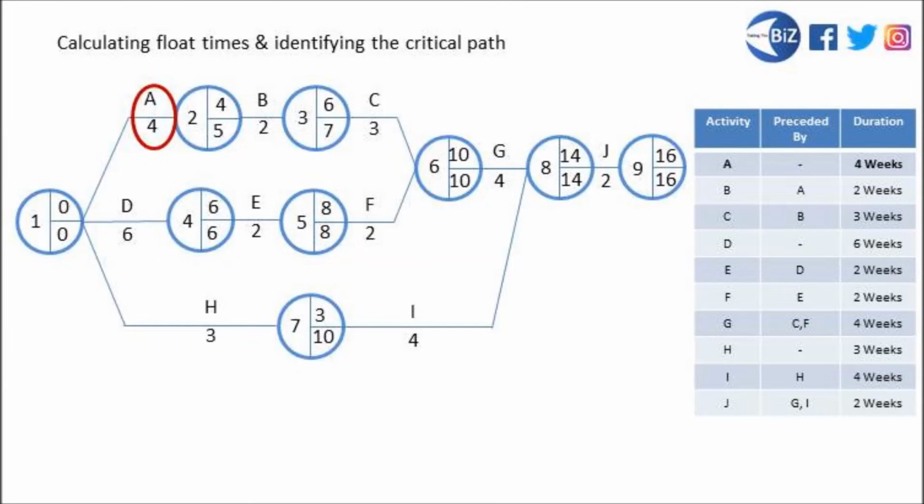And if this activity does have any float time, it means that it has got the potential to overrun without holding up the project as a whole. And if it has any float time, it means it's not on our critical path. It's not one of our activities that are critical to complete on time in order to prevent us holding up the entire activity. So we'll pop our earliest start time and latest finish times on the screen there for you.